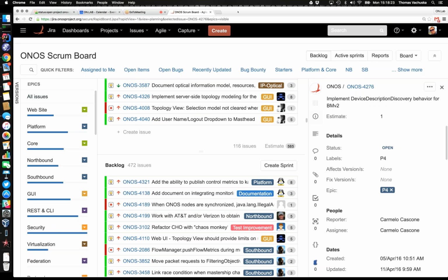You know, just by applying sort of rule of thumb by looking at the backlog. It's never gonna be precise, but the idea here is to almost statistically be able to get some faithfulness, by just looking at the backlog and these fairly vague story point numbers. It's been shown to work. The fact that last time during last sprint, if I'm not wrong, we arrived at something like 67 or 70% of work out of scope, which is not bad. It's kind of a record.